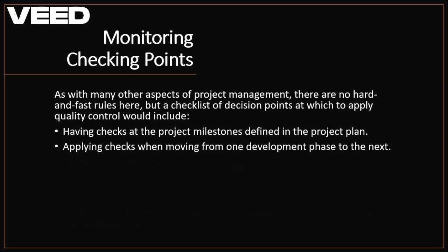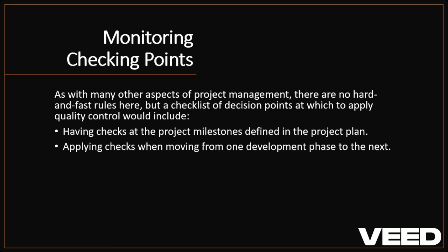Or you can apply checks when you are moving from one key stage to the other. So if, for example, you have completed your analysis activity, you can perform your quality check before you move on to the design phase of the project. That's another way.